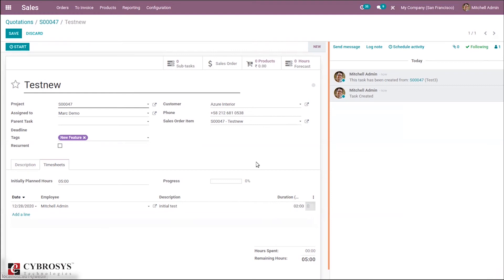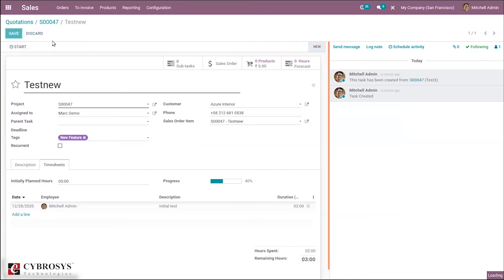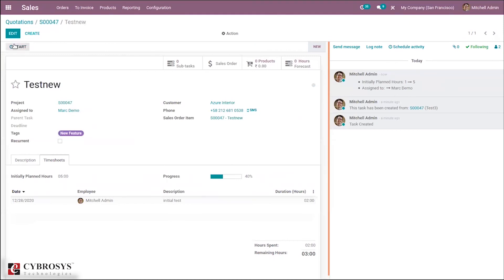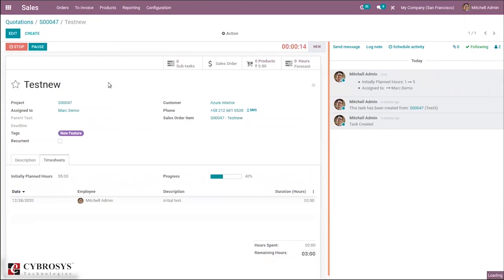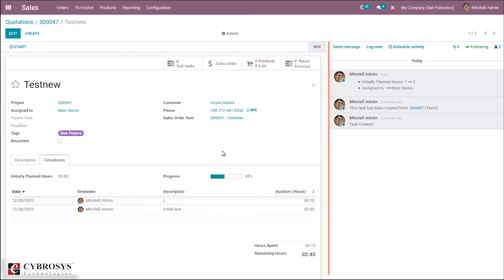When two hours are added, the progress shows 40% since the initial plan hours is five. This was added manually. You can also add time automatically by clicking start and then pause or stop. When stopped, you can add a description — it's not mandatory. A new line is automatically added with the duration, and the progress percentage updates accordingly.